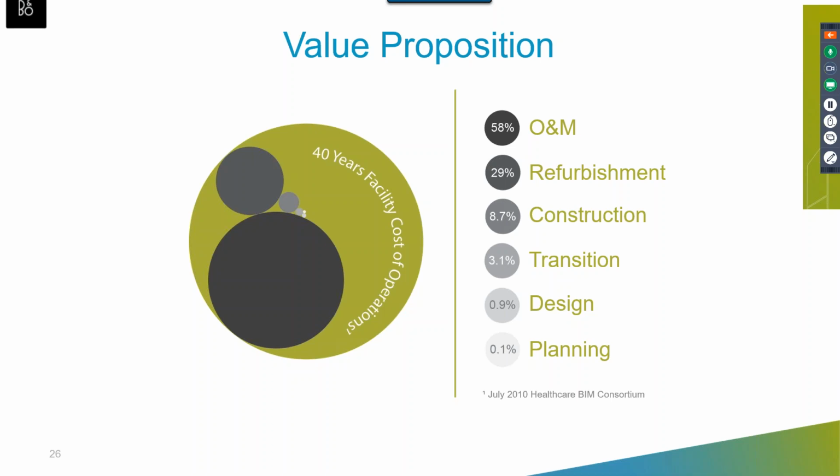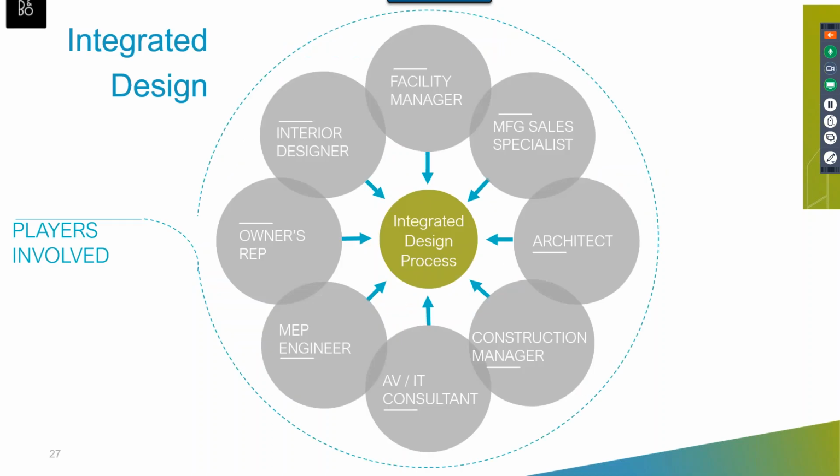So looking at that 29% number and thinking about how much that number could be modified, reduced, if we knew that those changes could be made because the manufactured approach to construction makes them so much less disruptive. There was a campus where we actually moved a student health center from the 3rd floor to the 1st floor of a building. And they weren't fully operational the day that we were complete, because some final measurements needed to be done for a few pieces of glass to be installed. But that literally was about a 5-day effort, and it was about a 2,200 square foot space. So when you think about what that would have cost, both in time and disruption, conventionally, you start to really see some of the advantages here.